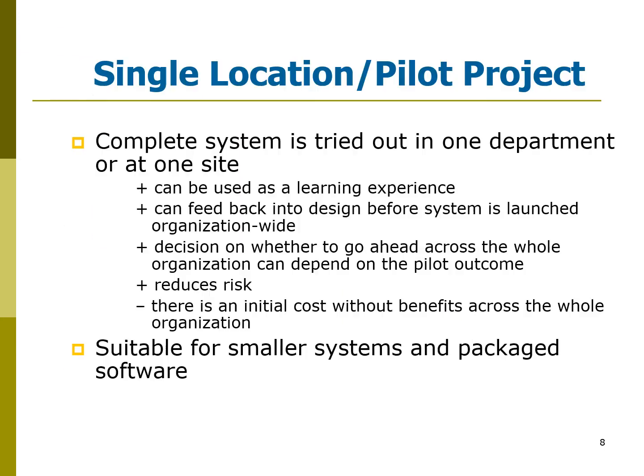Okay? So this kind of strategy is good because it can be used as a learning experience in one department without affecting others. You can give feedback on the design. Okay, check what the errors are before you launch it to the organization. Right? So whatever decision you make, you can do it first at one unit or department before you implement it. Okay, so it is good because it reduces risk.